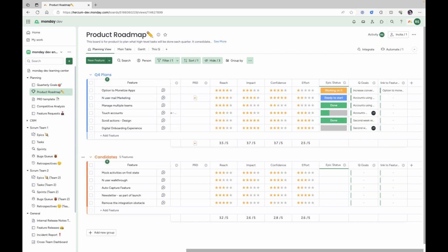Basically the reach is the audience and how many customers are going to be affected by it, how big of an impact, right? Each one of the items can be ranked for the impact, the confidence in terms of whether this roadmap item will hit its target, and then the effort is how much effort is needed. To make decisions of what goes and what doesn't go, you want minimal effort, maximum reach, and maximum impact, right? Having a happy medium on that drives the decision making.